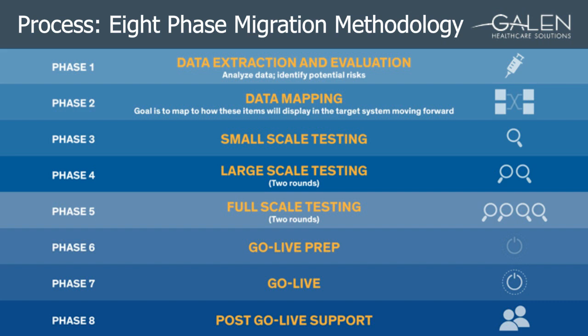The final phase of our conversion methodology is our go-live support phase. In addition to providing standard support, many times this phase is also to support when the legacy system has been switched to read-only. Many organizations decide to leave the legacy system up and running for a specific amount of time after the new EHR's go-live date, primarily to allow providers to finish any documentation, review results, and perform charge entry.